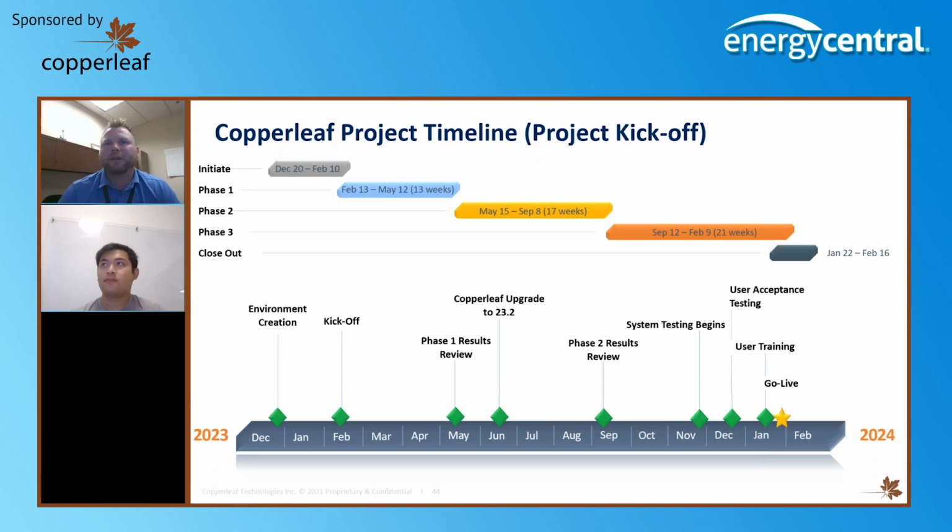We broke it into 3 phases to try and make it manageable chunks, and we did those based on the 13 asset families here at BG&E that categorize all of our substation assets. We started with 3, understood what that looked like, and started to analyze whether it makes sense from a replacement program perspective. We targeted, I think, relays, transformers, and breakers.